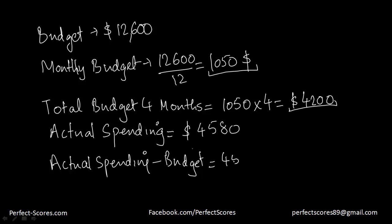So that would give us how much did the budget go over by. So that would be $4,580 minus $4,200. So that would be $380, which is nothing but our answer option A.